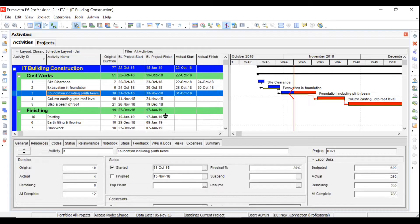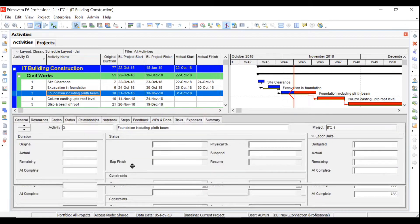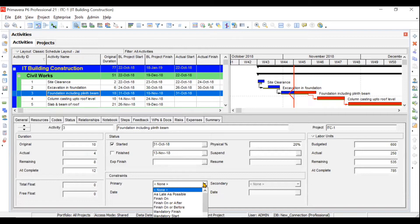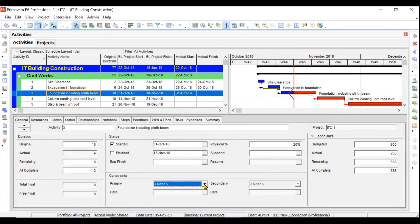We will also cover constraints. In the detailed view under status, you have the option to assign constraints to your activity. Similarly, you can assign constraints to your project as well, such as finish by, finish on, or start after a certain date. If you have important constraints for activities or for your project, you need to assign them here.